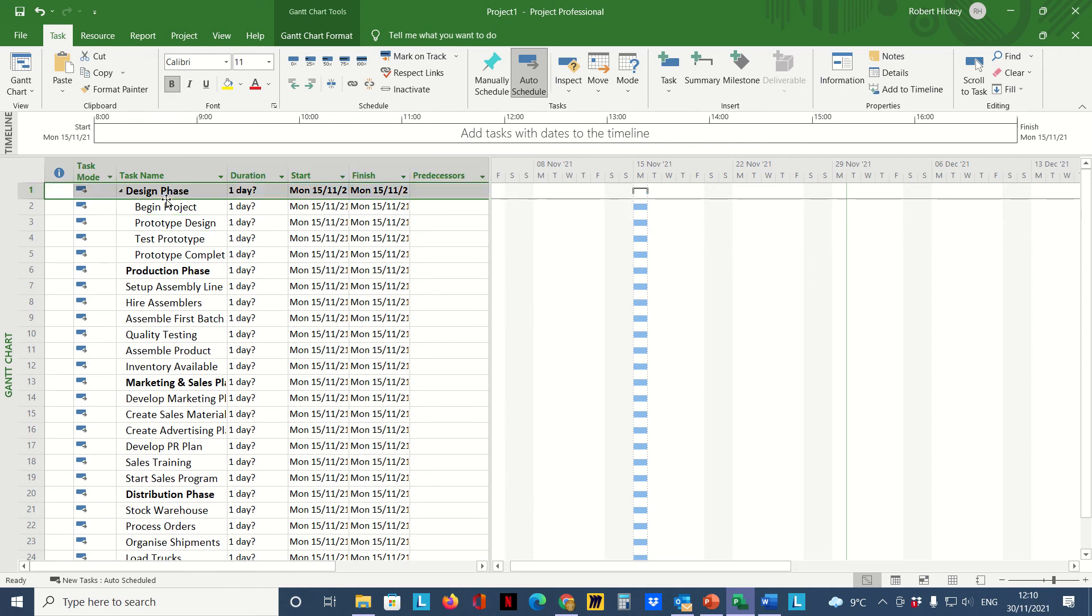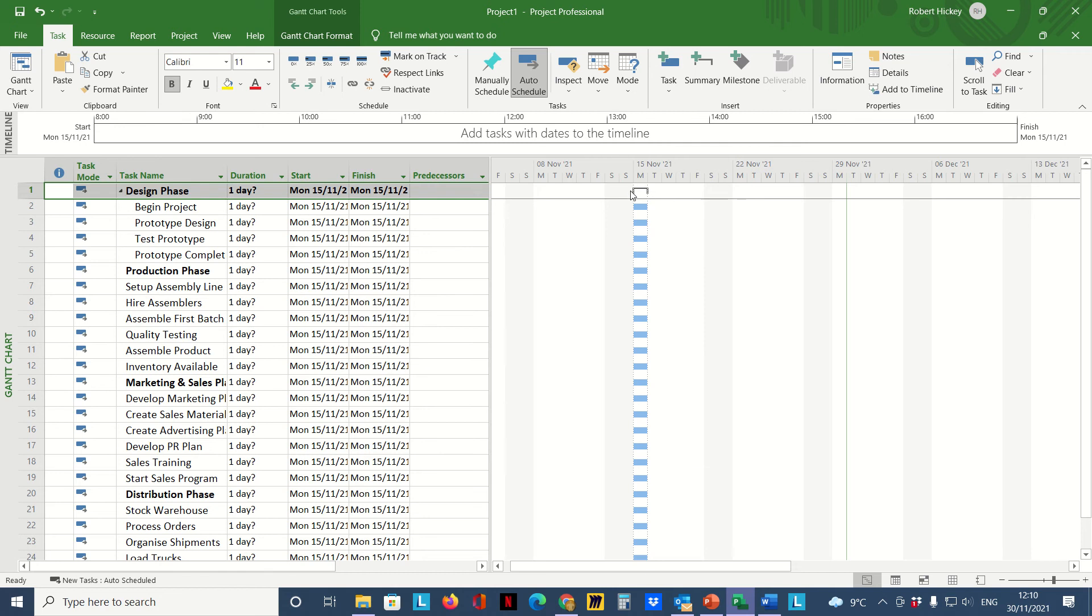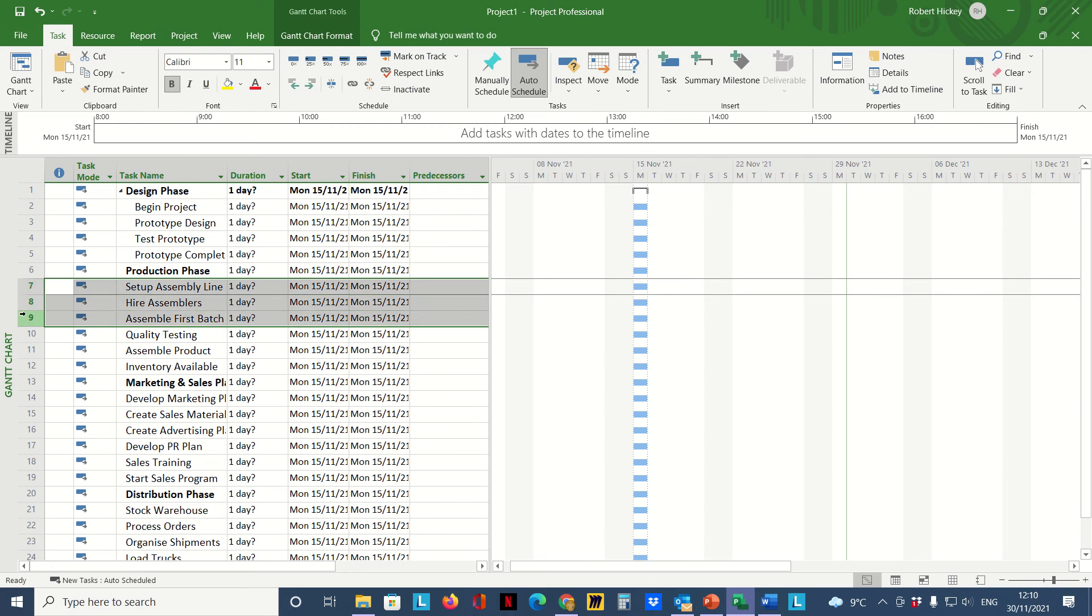Now we can see that those tasks I've just indented have been rolled up underneath my Design Phase. The Design Phase task has now become a summary task, and I can see that it's a summary task because if I look over in the Gantt chart I can see the summary task is indicated with a black line, the black hook there.